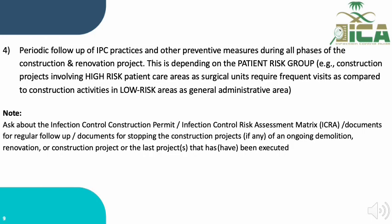Based on the risk assessment, each construction type will identify measures required pre-construction, during construction, and post-construction. The IPC team must monitor if these measures are in place, and if not, they have the authority to stop the project. Required documents include the infection control construction permit, ICRA matrix, regular follow-up records, and documents for stopping the project if applicable, for ongoing or recent projects.